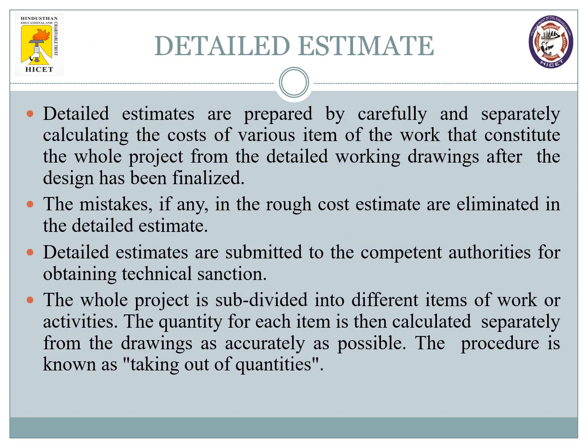Right, in this slide we will talk about the detailed estimate, which should be used for all projects in the field. Detailed estimates are prepared by carefully and separately calculating the cost of various items of work. You need to calculate all items of work, whether it is a very small or tiny work. It may be around 8 hours of work, 16 hours, 1 hour or 2 hours. Every work has to be accounted for, and the cost for each item of work has to be included.